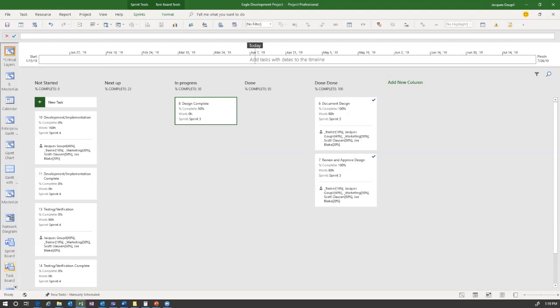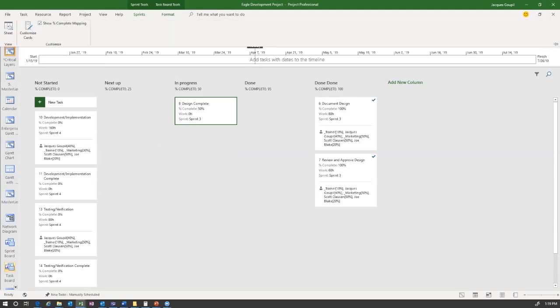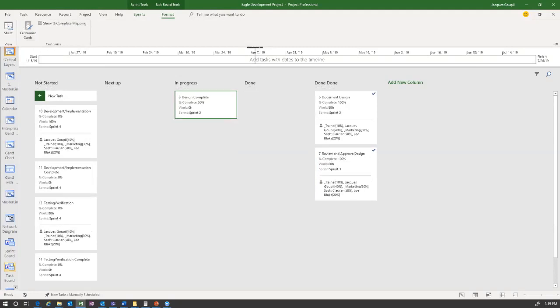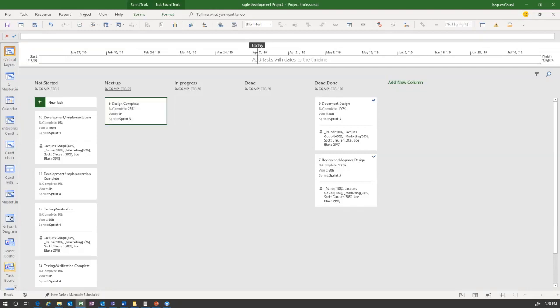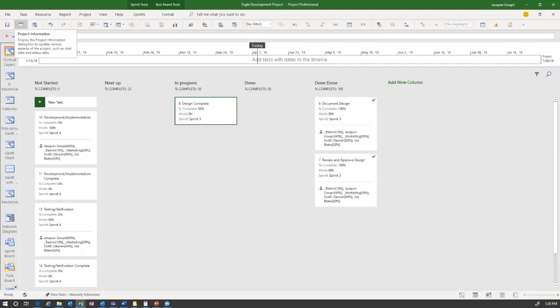However, if my percent complete comes in through a different status or a different area, and I'm looking at a particular task board, that's where I'm potentially going to see a difference in my percent complete versus my buckets. Literally, these are buckets. When I move things into a bucket, it will get that percent complete, as you can see here. So I mentioned when you roll this out, if we're talking about best practice for percent complete, let's do it with the task board and drag and drop, or let's not do it over here and let's do it within a different view, the Gantt chart, etc.